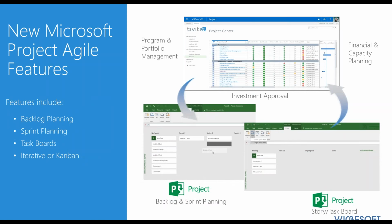And in this case, you can do things like structure sprint schedules and cadences on how you're going to deliver your iterations, build backlogs, and then allocate them to those sprints, and then track whether they're in progress or done or not. You're going to get into some of this stuff in the demonstration today. But the key is all the project and portfolio management, the financial management, resource capacity planning, even the investment approval and intake process still happens in the portfolio management solution. It's just a different choice on how you're going to execute on the details.